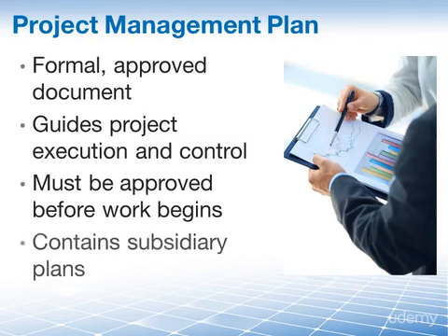Well, it contains subsidiary plans and subsidiary documents. For instance, it contains the scope baseline, which includes the scope statement, and in there we will be able to figure out, okay, what kind of tasks are we going to have to be working on our project. That will help us to develop a plan for managing time, for managing our schedule. It also contains other scheduling related information on cost, risk, and communication decisions that have already been made that are important to know as we are planning our schedule.